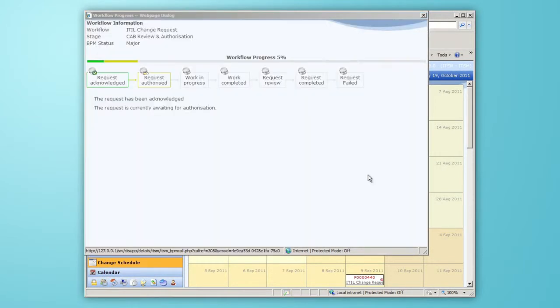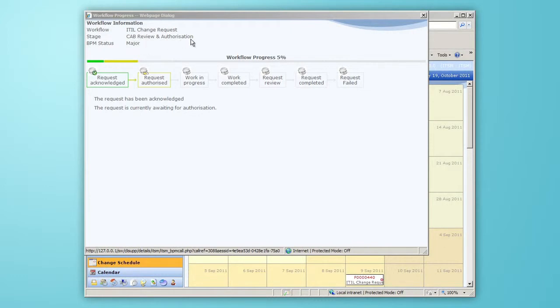The workflow progress tells me the request has been acknowledged and is currently with the change advisory board for review and authorization.